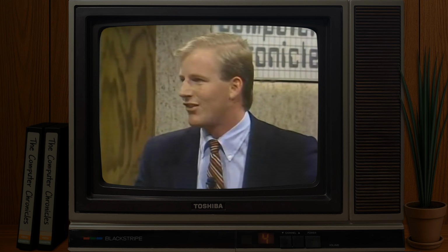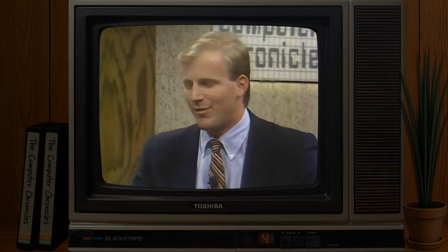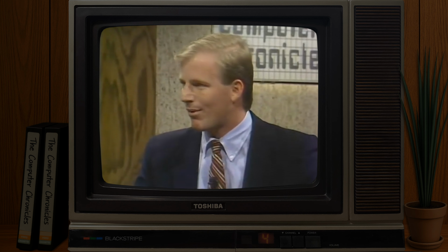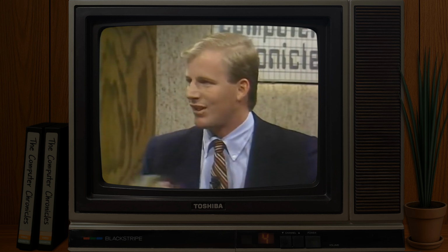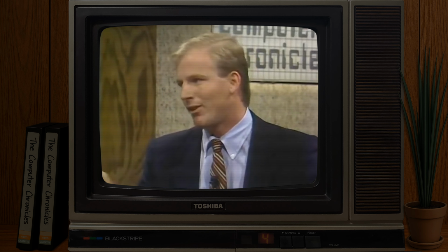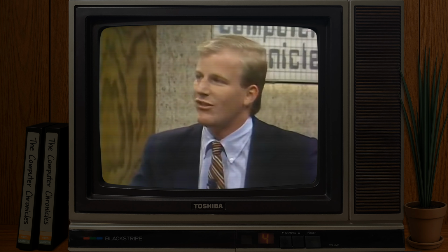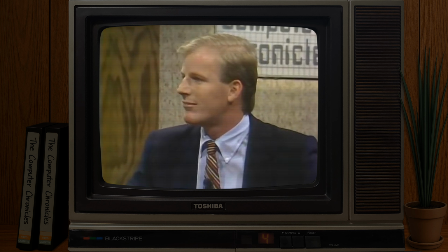Well, now in the classes that you teach, how do you take a person like that, that's a good hip shooter, and teach him to use something like this as a tool to help him be a better hip shooter rather than to change the way he manages? Okay, the important thing is how he tries to model his project. He's got to, rather than breaking everything down into infinitesimal levels of detail, every activity being broken down hour by hour, model projects at the level of detail that he's used to thinking about them. If he gets it compatible with his management style, he'll support it, and it'll be a tool that he can use. And can people under him break it down further if they need to?